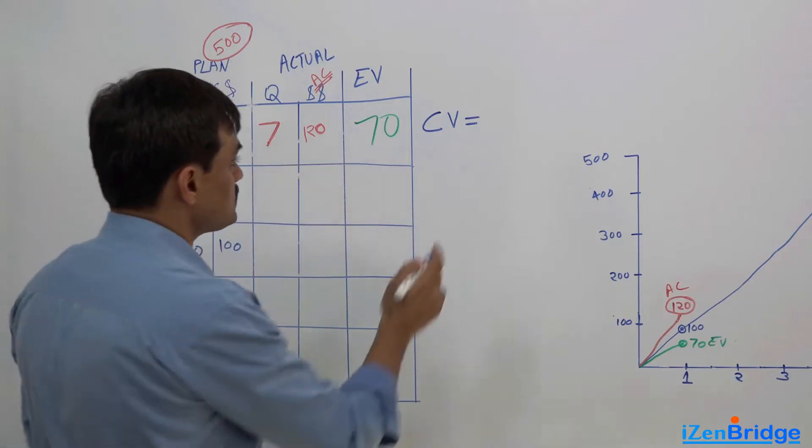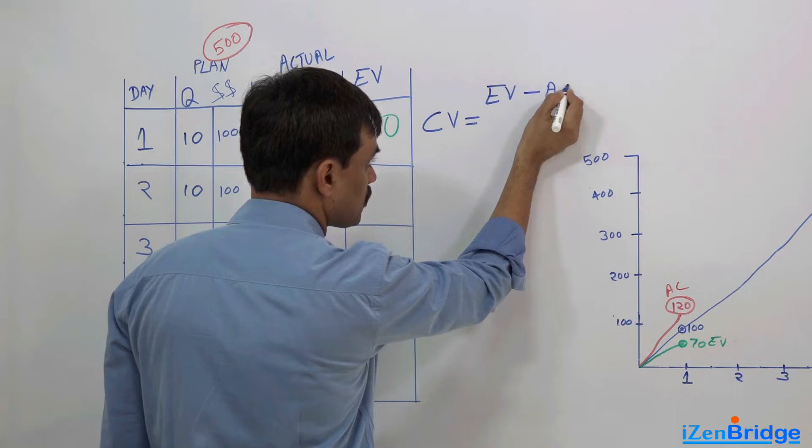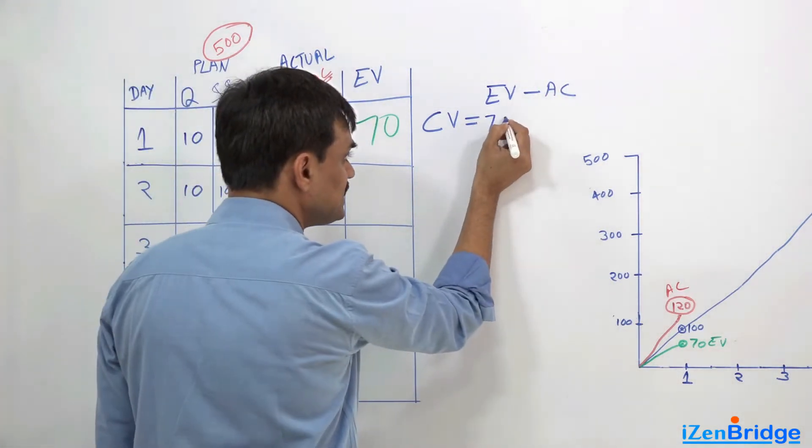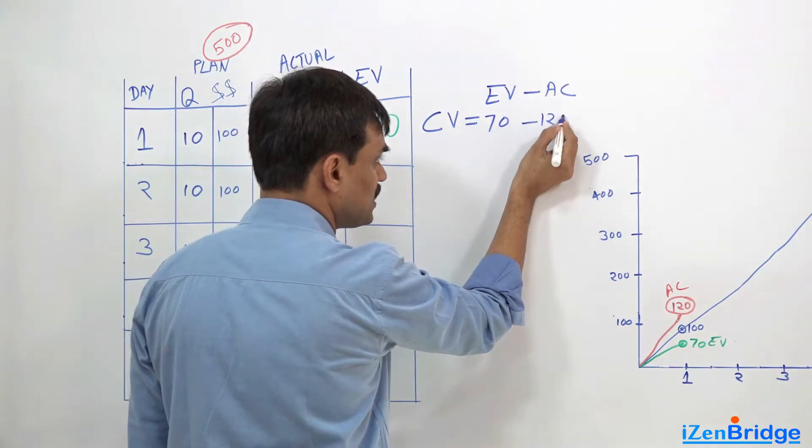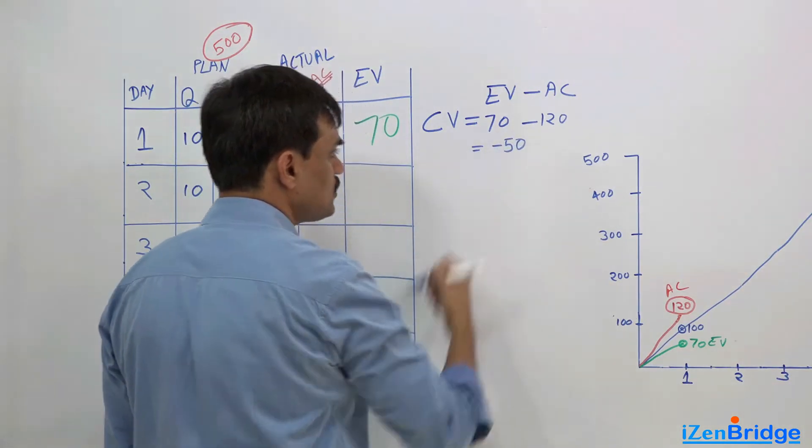So, the first thing as a formula is earned value minus actual cost, and that makes sense as well. We earned 70 and we spent 120. For this particular case, cost variance was minus 50.